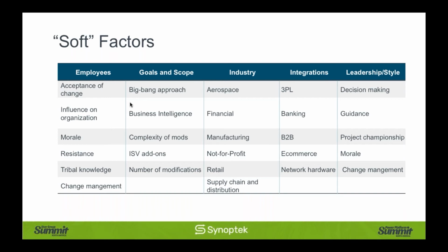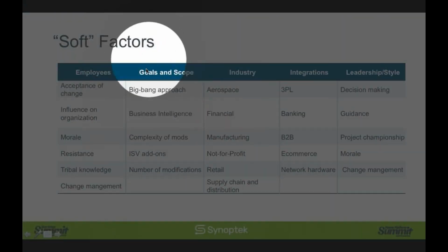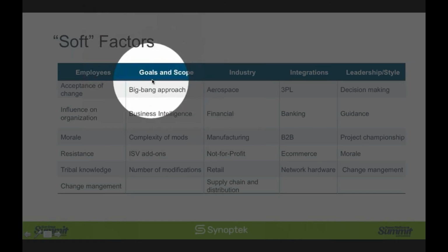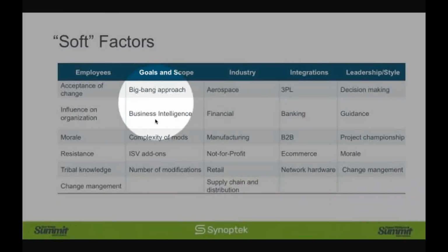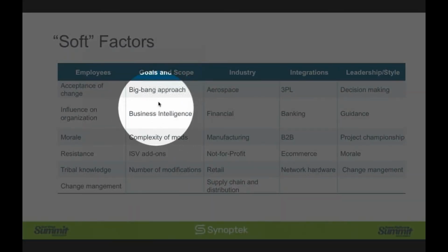A part of what I also observe is that when we're going for this big bang approach, when we're piling on a number of different customizations, integrations, and pulling so many aspects of the business into that first phase of the project, the level of complexity will quickly increase. The amount of time you're spending in your meetings, going back and forth on decisions, and sometimes even bringing in an unnecessary customization that drags the project in a number of ways, including costs, right?